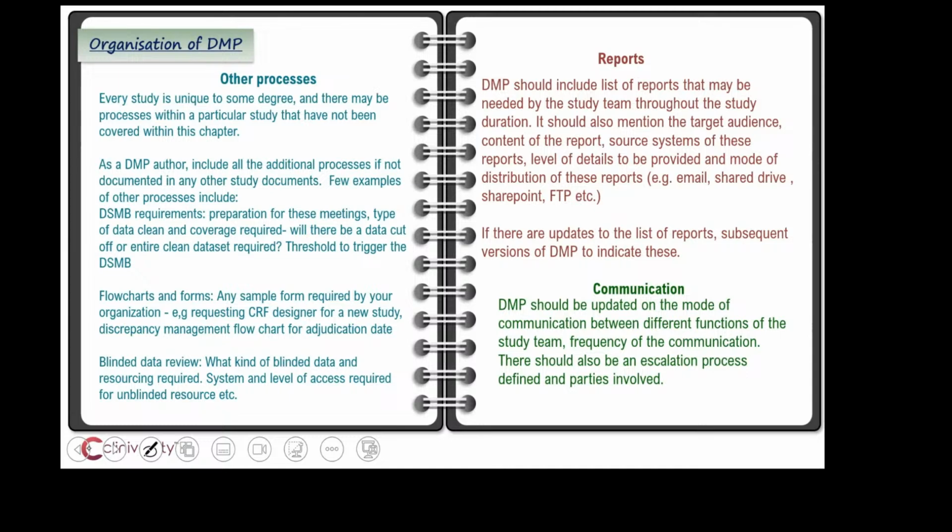Other information that can be put in is business rules, specifying rules that will have an impact on the data handling and data integrity. An example would be regularly scheduled IT maintenance, which will limit server access, or organization-wide holidays, or an anticipated address change during the course of the study, which may affect the data handling.